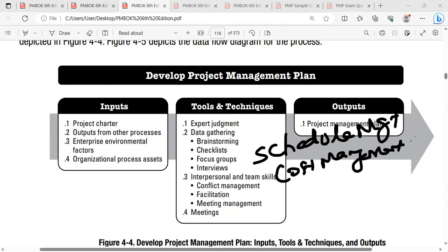Each and every domain area should have its own management plan, because each management plan is a mother document for its own processes. If you have 7 processes under risk management, the risk management plan will be the mother document for all its subsequent processes. It has to give proper guidance, and clear information on who will be the process owner, who will support the process owner, and what kind of template they have to use.